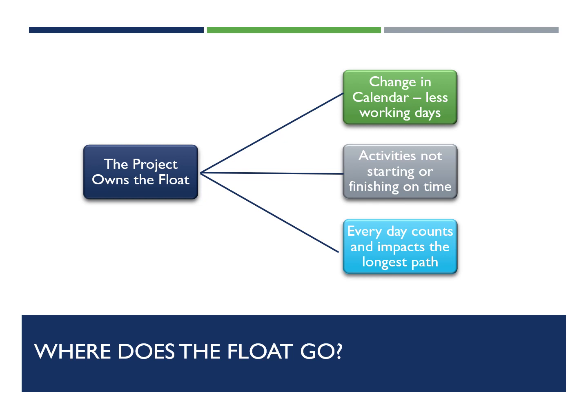Well, if they don't get that activity done for 2 weeks and it impacts all the following activities, and then one of those other activities is delayed for one reason or another, and that becomes the new longest path, and that becomes the critical path, then it could potentially fall back on the contractor who said, oh, I have 2 weeks before I need to finish this, and they could be held responsible for liquidated damages. Every day counts. Keep that in mind.